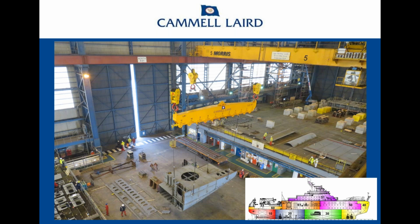And in fact, this picture shows one of the units. This was one of the first pieces to be put down. And the operation that was going on here was the inverting of the unit from its upside down manufactured position to, as it's shown now, the right way up. This particular unit was about 130 tons, and we do these inversions on a regular basis.